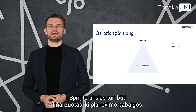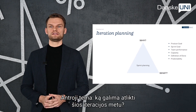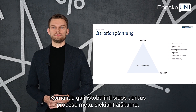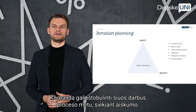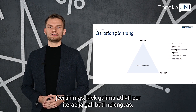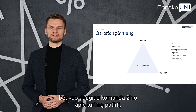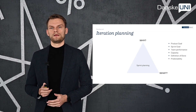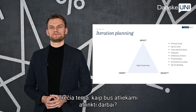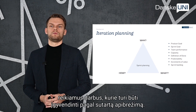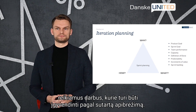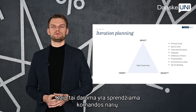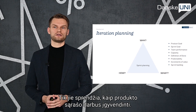The whole team collaborates to define a sprint goal that communicates why the sprint is valuable to stakeholders. The sprint goal must be finalized prior to the end of sprint planning. The second topic is: what can be done in this iteration? Through discussion with the product owner, team members select items from the product backlog to include in the current sprint and may refine these items during the process. Selecting how much can be completed within a sprint may be challenging, but the more team members know about their past performance, upcoming capacity, and definition of done, the more confident they will be in the sprint forecast. The third topic is: how will the chosen work get done? For each selected product backlog item, the team plans work necessary to create an increment that meets the definition of done.